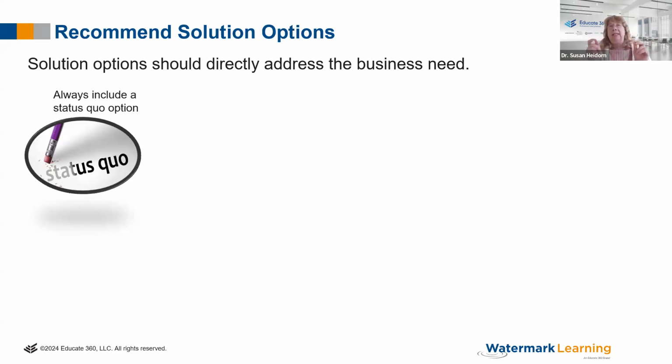One of them is always going to be status quo, because it is always an option. You don't have to do anything, but there's a cost. There's a risk that we need to capture, because people go, well, why do we need to do that? Well, you don't. We don't have to do anything. You might want to, though. So option A should always be status quo, stay the same.